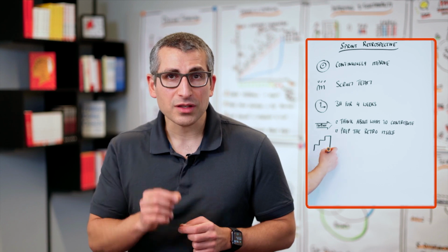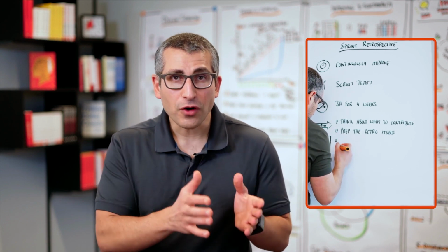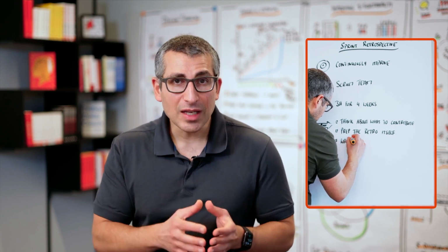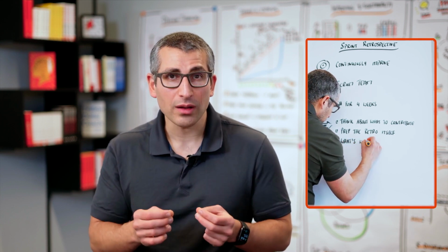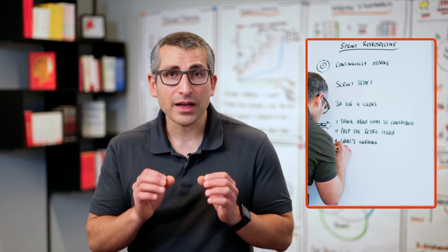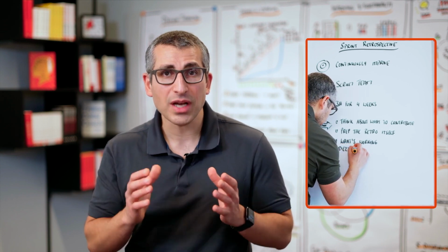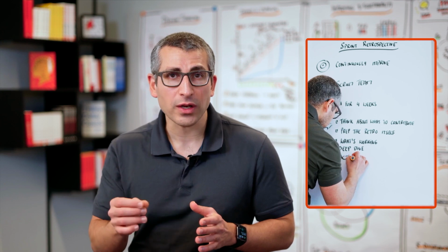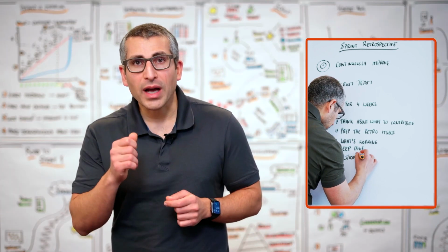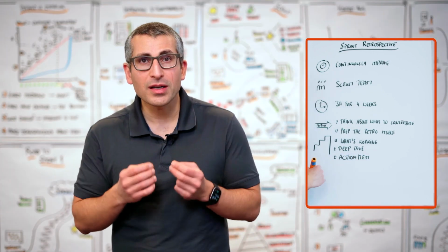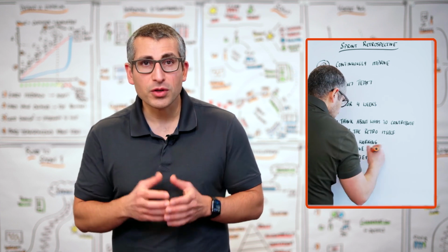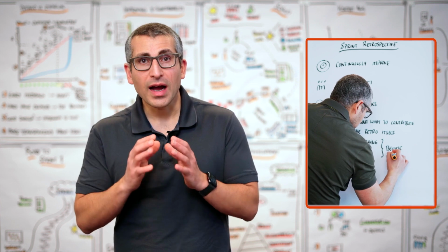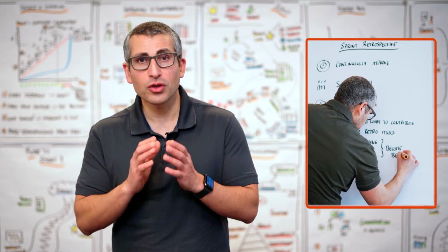Most retrospectives consist of 3 elements. First, identify what's working well and what not. Second, deep dive into those things that are not working well. And third, identify a concrete action item, or as the Japanese say, Kaizen, to do differently in your next sprint. That action item should ideally result in your team becoming better. Better in terms of how they feel, better in terms of how they work, better in terms of how they deliver value to your customers.